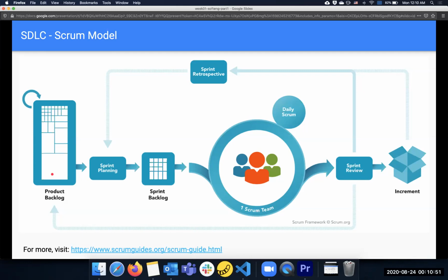And they are continuously refined and prioritized. So each sprint, which is a time box of 2 to 4 weeks, the team will pick the top few stories that it considers it can deliver based on its resources and time. They will commit to say, we're going to deliver these 5 stories. They're called stories because the items in the backlog are written from the user's perspective.